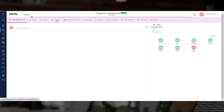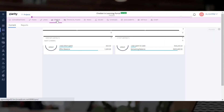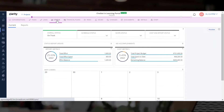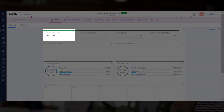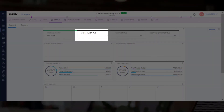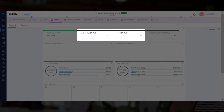Let's open the status module. We typically start by entering the overall status of the project. The status is derived from the schedule status, scope status, and cost and effort status.